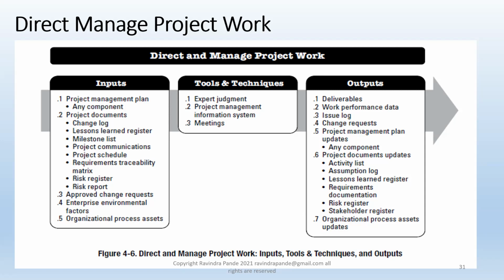So that if you add the work in a current sprint, current development cycle, we need to understand that the additional work has to be allocated to additional resources, because we already planned the task activities within a given sprint, with a given phase.